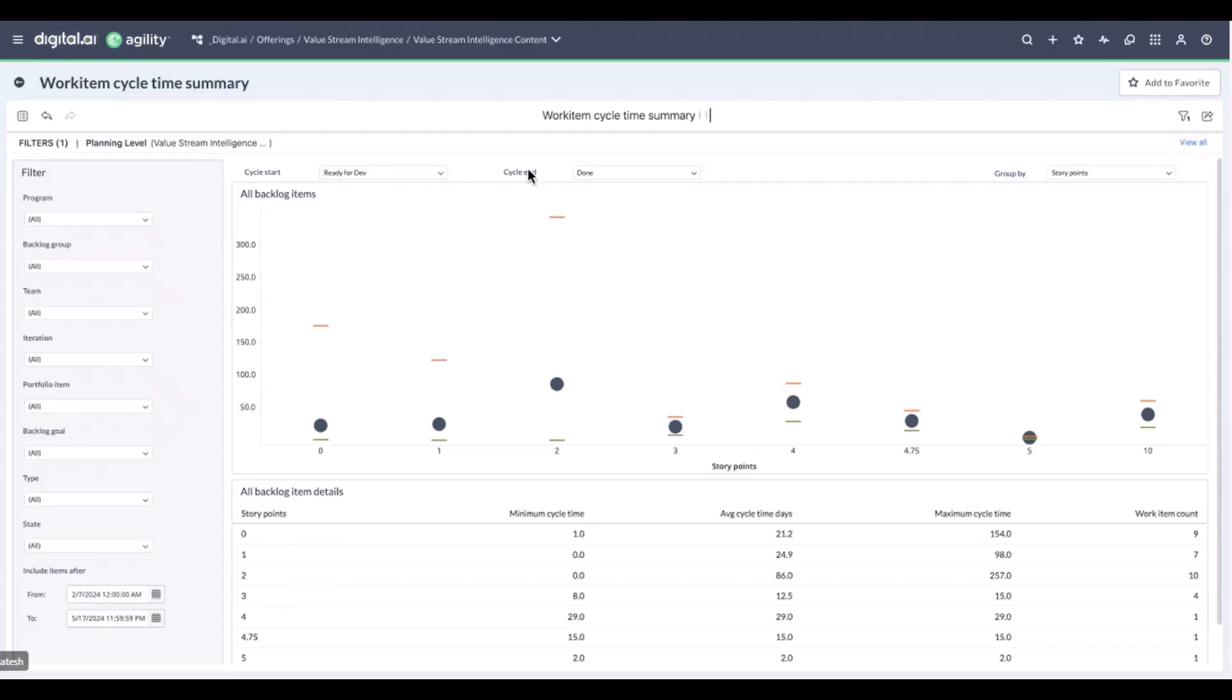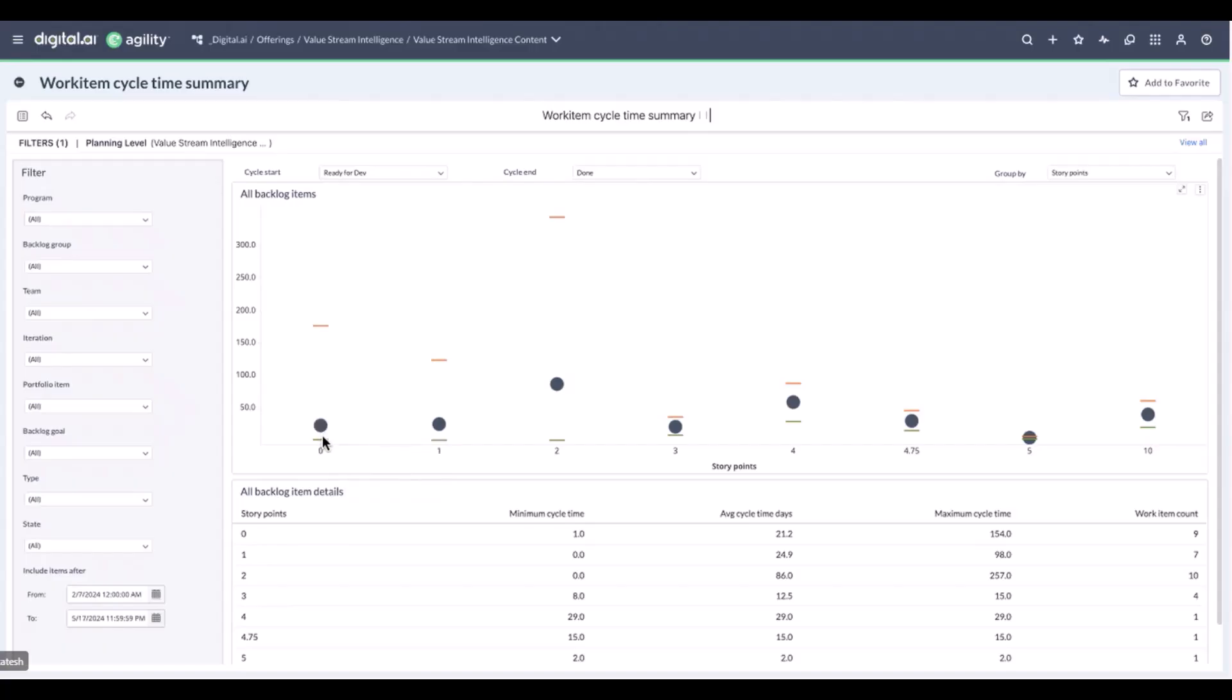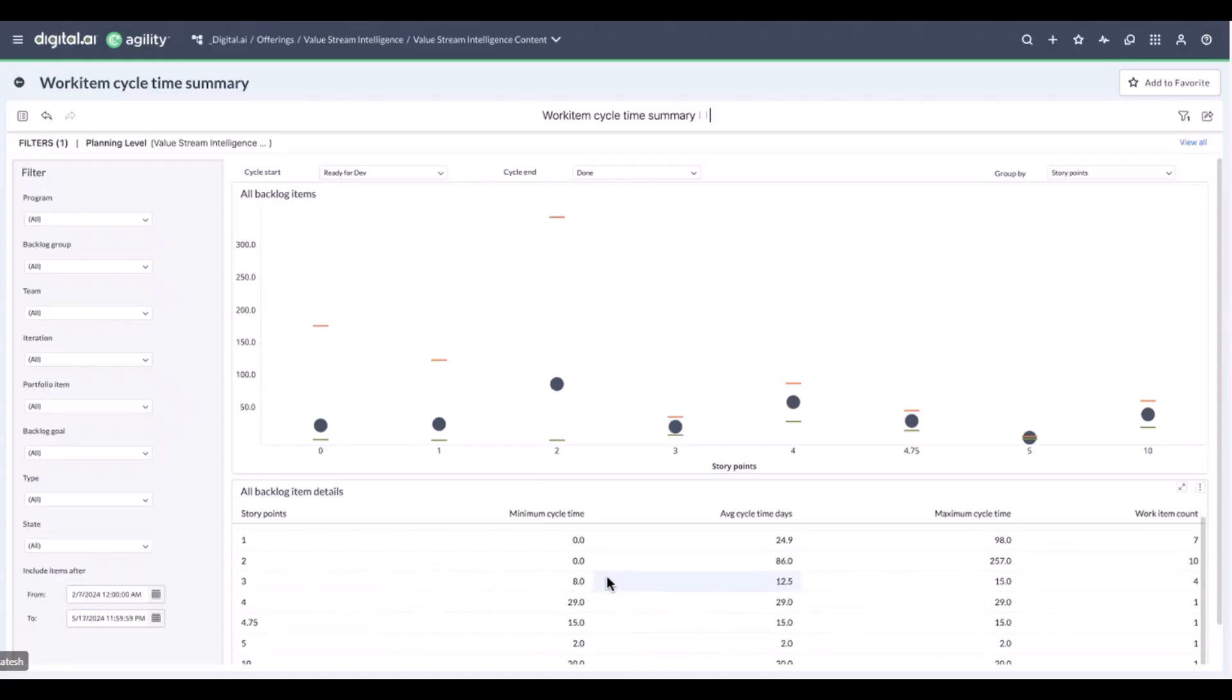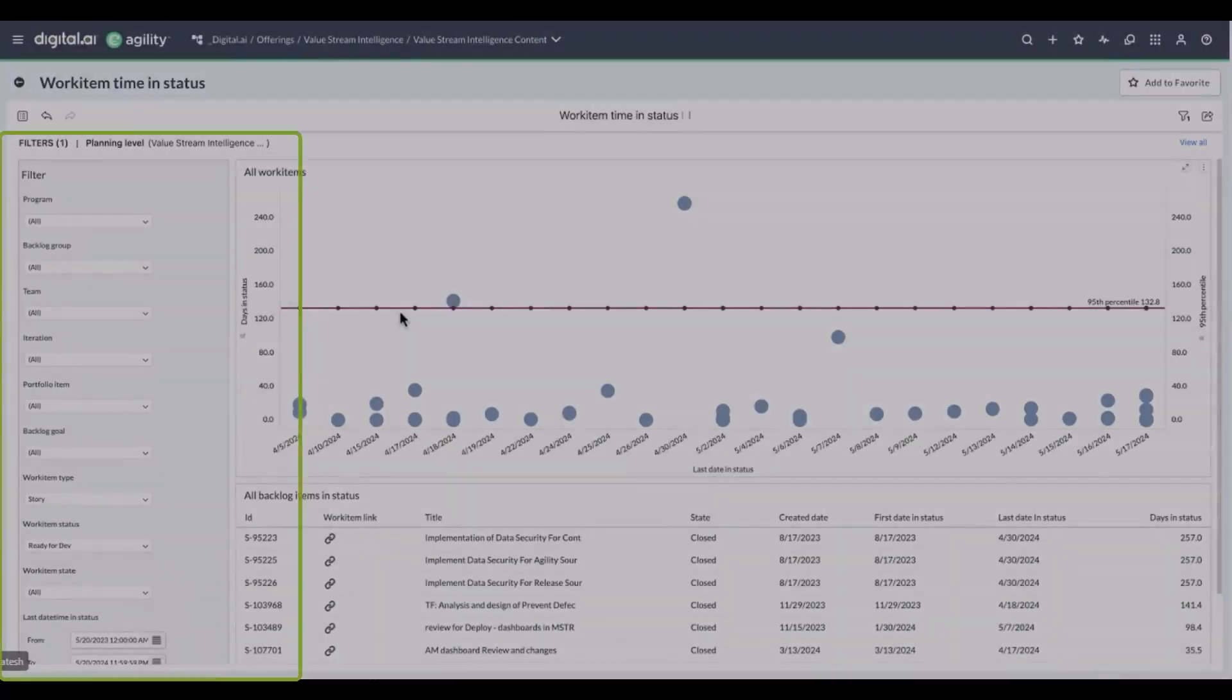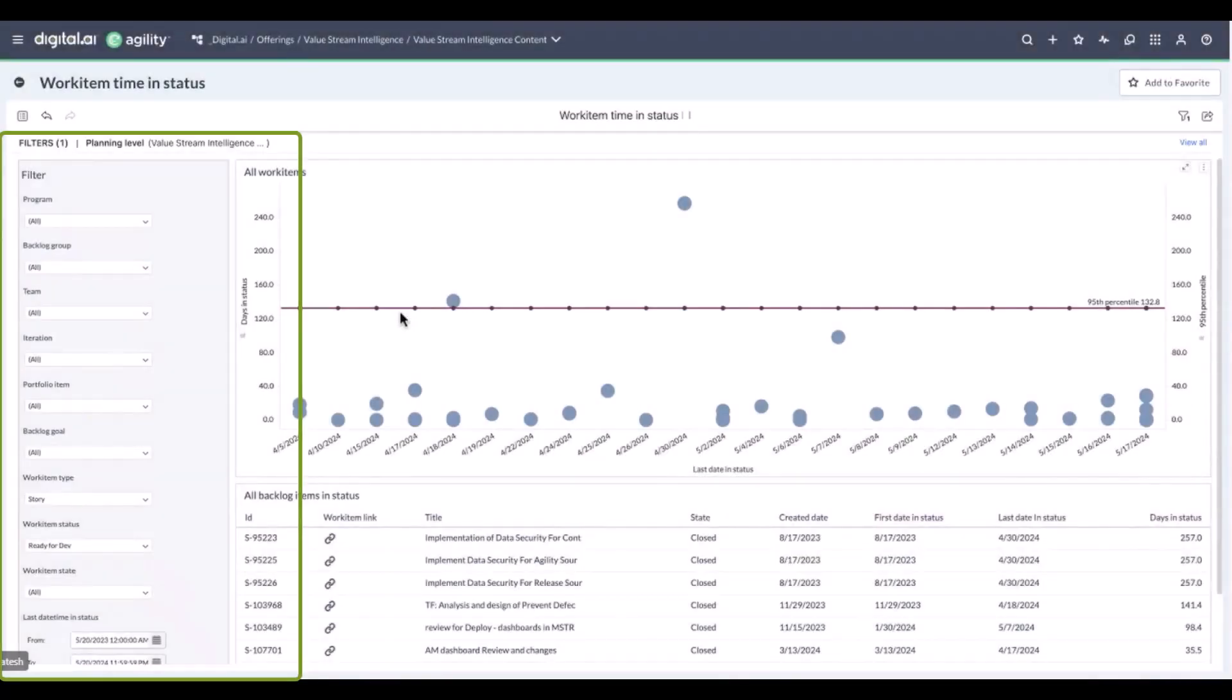The average is 21.2 days, and this took us probably about close to one day, the minimum cycle time. So that's the three key data points. And as you can see, we have different representations of the same data here at the bottom, all of which help you understand where work is stuck.